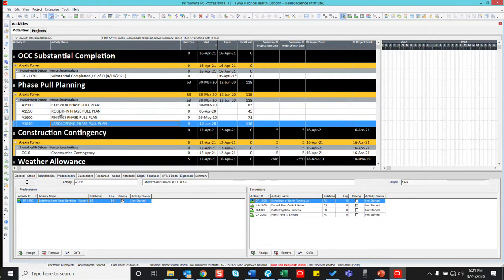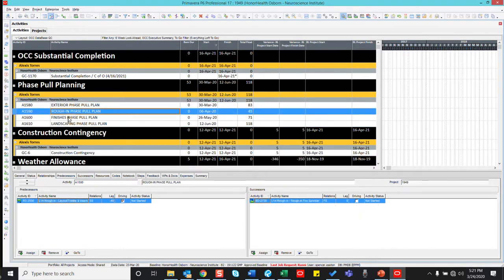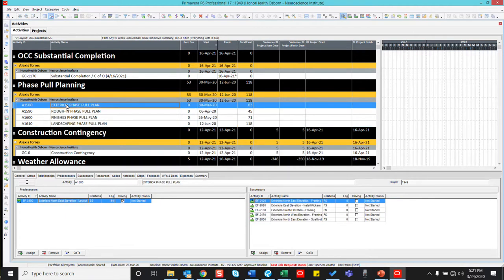What that'll do is that'll ping the team to remember to do that pull plan, and then also will identify for field operations what major planning processes should be taking forward as they contact the teams and understand where the project's at. This is very useful for field operations in where they should be. If there's not any critical work, they can work with the teams on going to these pull plannings and making sure they have support from our operations side for these major planning processes to take place. So that's those first two.